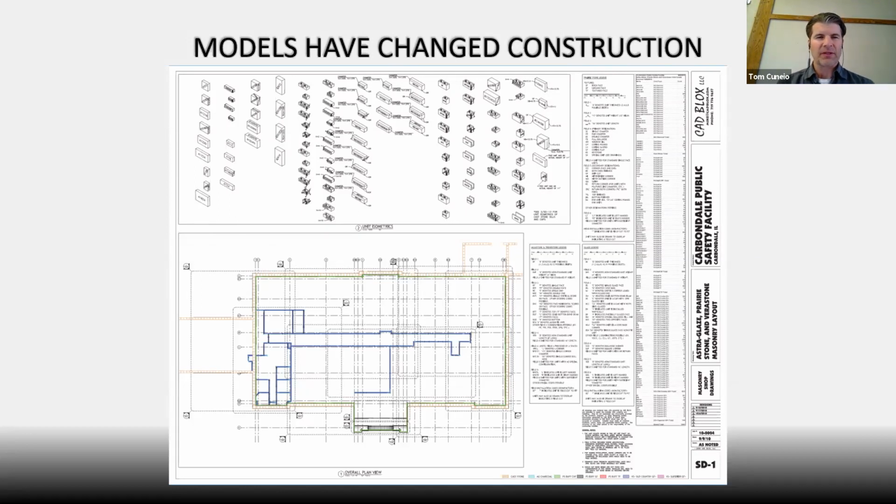As I kind of briefly hinted at, we're using these models for production orders. Every unique shape, piece, and part is accounted for in the models. So we have an exact production order. We know exactly how to build now. This has eliminated maybe 20% or more of the material cost side, because prior to models like this, we just didn't have tools to get accurate enough.